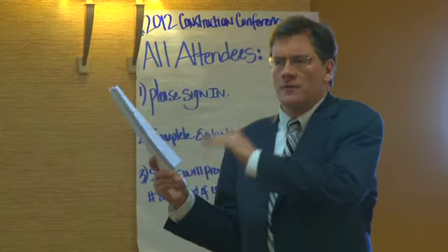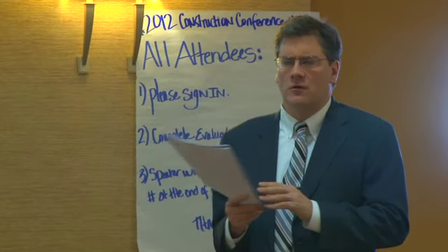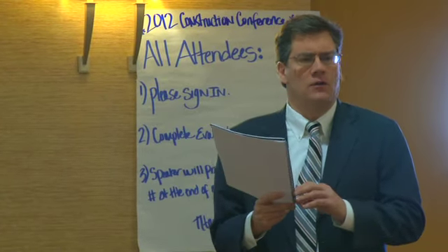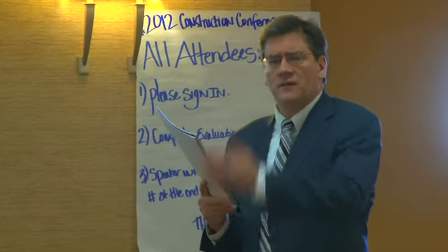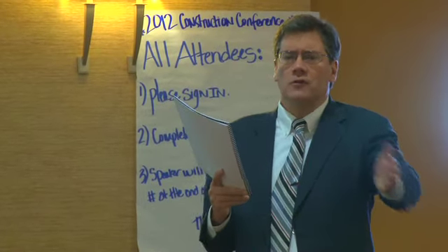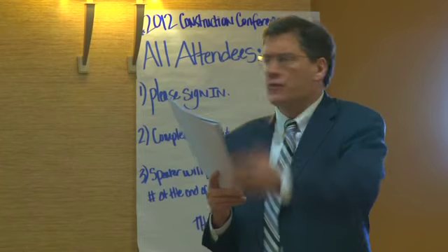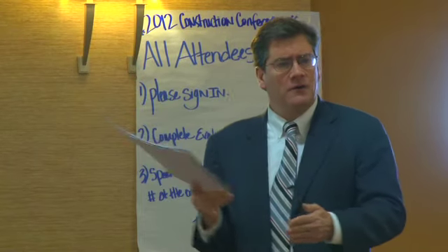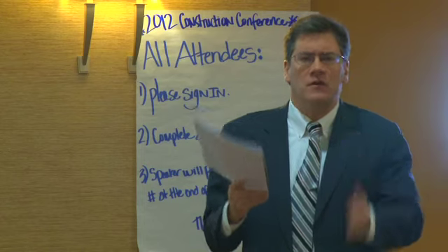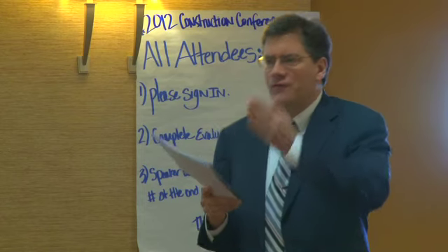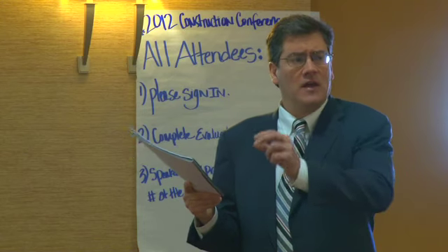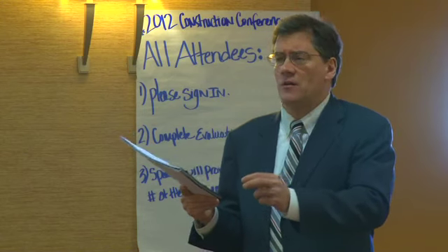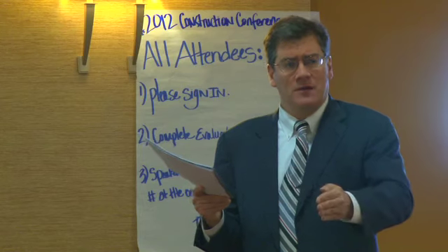That's part of the money you owed on the project, not all the money you owed on the project. There's an unconditional release on progress payment. That's saying my rights are gone through a particular date certain, and you've got to make sure you've been paid everything you're owed through that date that shows up on these documents. Then there is a conditional waiver and release on final payment, meaning everything you were going to get paid, including that retention amount, that 5 or 10% retention, that's got to be in there.